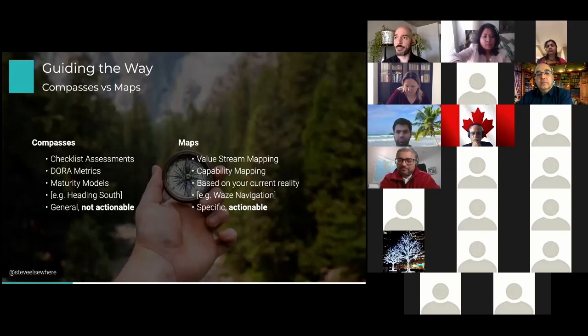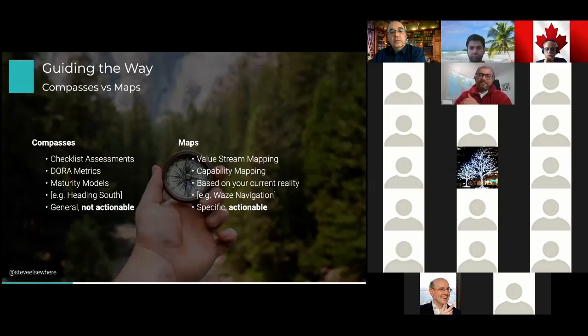By mapping the value stream, we were able to pull out everything that was happening. We went step by step through the process of how they ship code, and we were able to highlight specific areas where, if we were to invest some time automating or improving the process, we would see massive improvements. And we could measure and forecast those improvements. I'll go into a little bit more detail about how that comes together in a bit, but that's a great question.